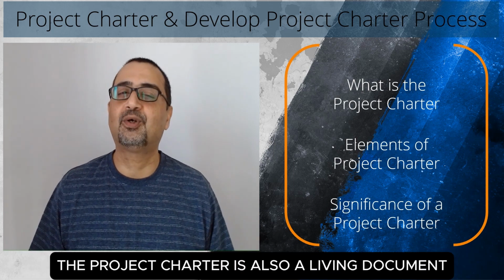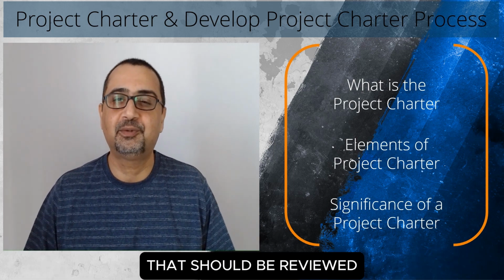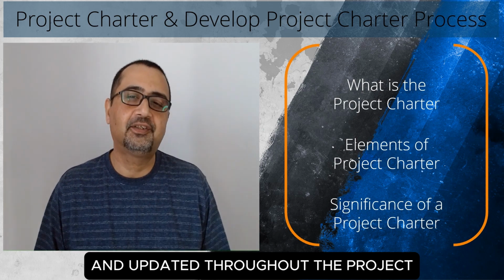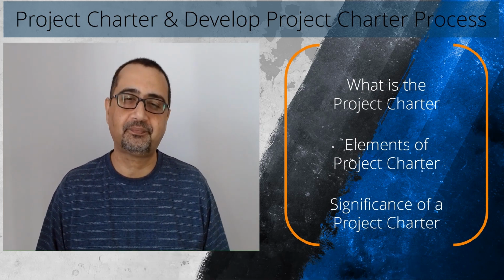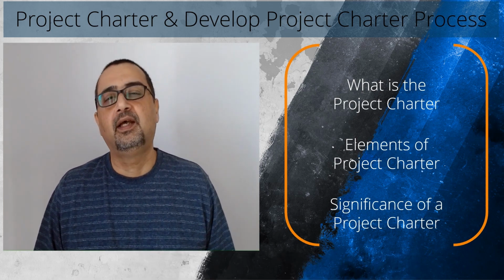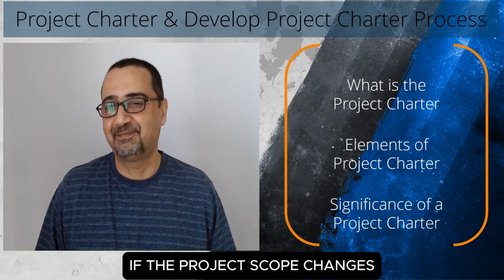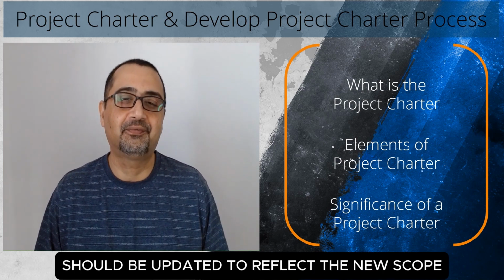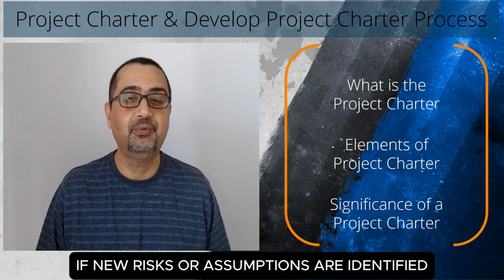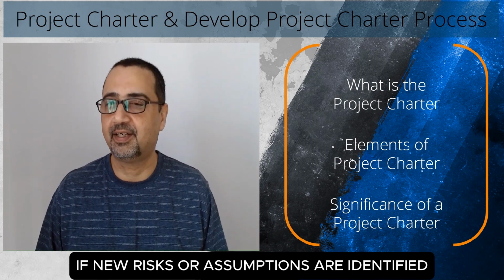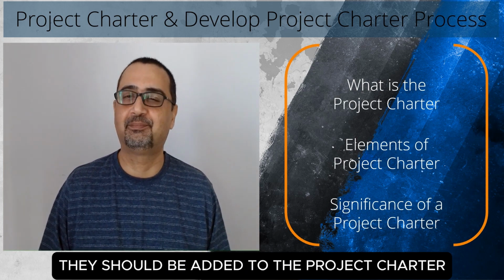The project charter is also a living document that should be reviewed and updated throughout the project as needed. For example, if the project scope changes, the project charter should be updated to reflect the new scope. If new risks or assumptions are identified, they should be added to the project charter.